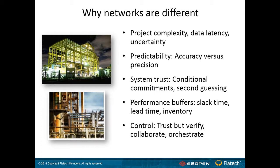But if you were to ask the owners of the process, how good is your process? I think every one of them would say, gosh, we're 90% good. We're pretty accurate most of the time, at least 90. But if you take that through a sequential process, you multiply those six steps, what you get is a 50% information throughput accuracy, which is unacceptable.